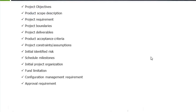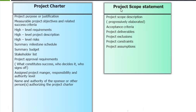We saw the contents of the project scope statement and the difference between the project charter and the project scope. The project charter talks about the purpose of the project, objectives, high-level requirements, high-level project description, high-level risks, summary milestones, summary budget, stakeholder list, project approval requirements, assigned project manager, responsibility and authority, and name and authority of the sponsor. The project scope statement, on the other hand, defines the project scope description, acceptance criteria, deliverables, exclusions, constraints, and assumptions.